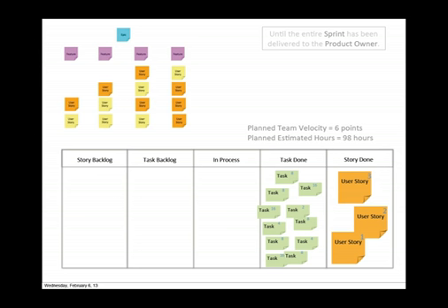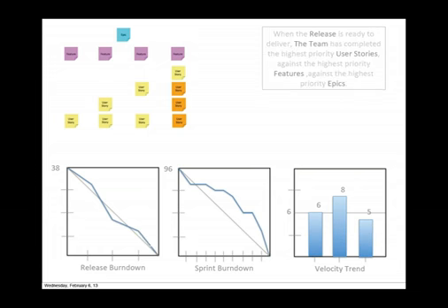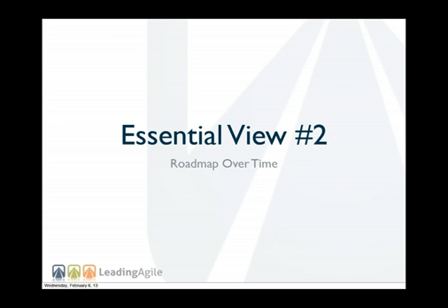So as an Agile program and portfolio manager, not as a Scrum Master or product owner or a team member, what I care about is that a team can establish a stable velocity and relatively accurately commit to high-level milestones a little bit further out than normal, because program and portfolio management is going to integrate those milestones into connected wholes. Again, this is all straight out of the Scrum textbook. We want sprint burn downs, we want velocity trends, we want release burn downs. All of this is in an effort to help teams become more predictable over time so that they can integrate tightly with all of the other teams around them. Okay, so this is all pretty basic stuff.